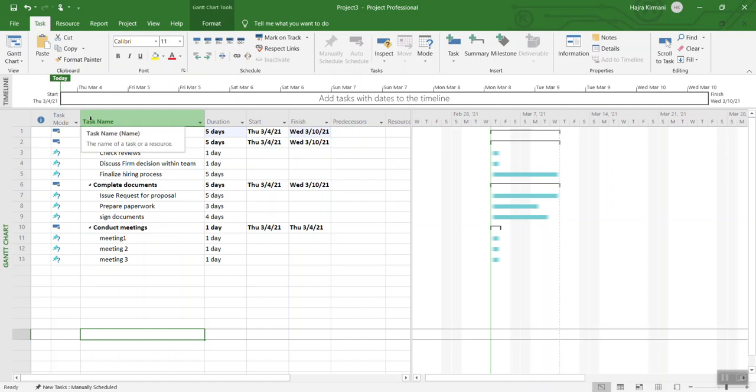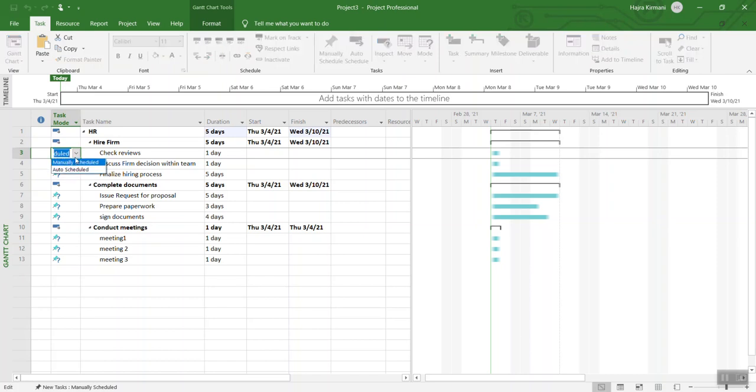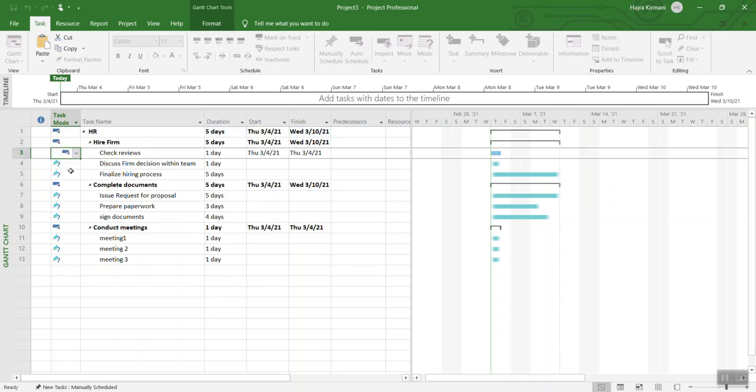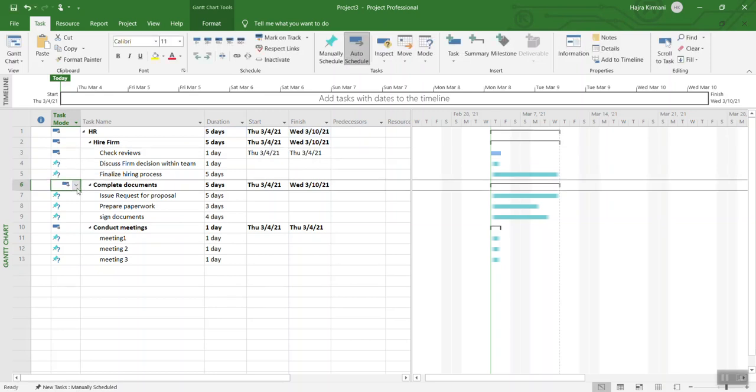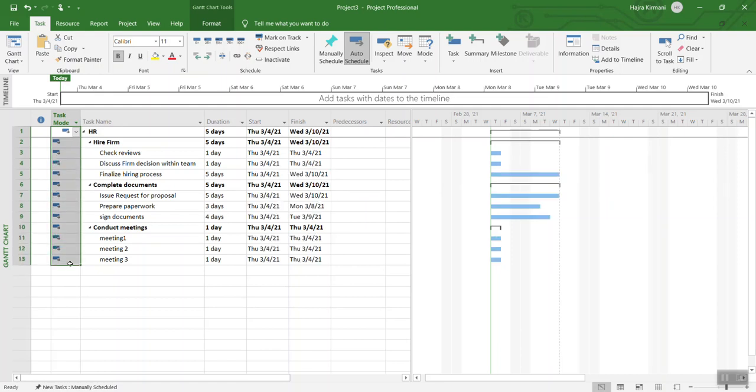This is one of the basic features of organizing your items. Also, I would recommend to change the task mode into auto schedule because that really helps with the scheduling process so that you don't have to do it manually. I'm going to do auto schedule.